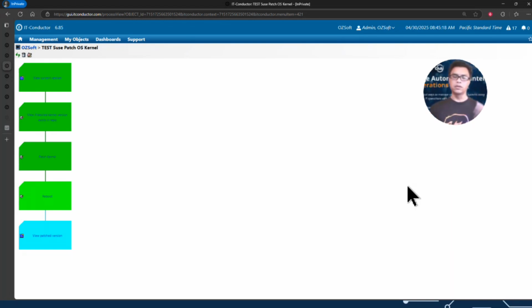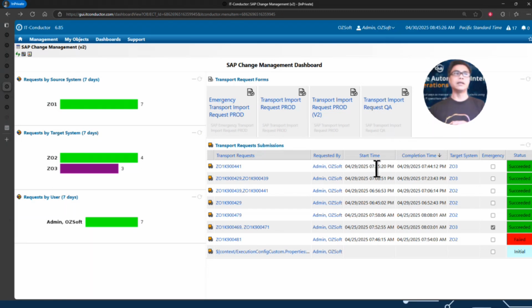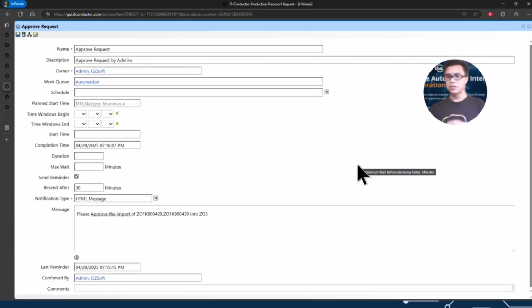you may be an approver. So as you can see, an example in here, in the change management, we have the ability for, let's say, if it is a production change, there is an approval process, and the approval process here, for instance, can be routed to only managers and assigned certain roles. We can integrate with even Active Directory and have groups of people belonging to different groups for their responsibility. So there is a segregation of duty sort.